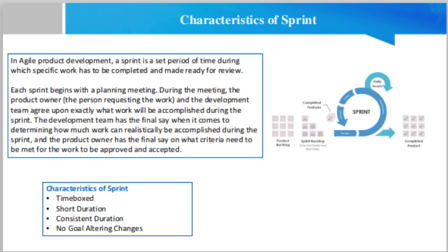The duration of a sprint is determined by the Scrum Master, the team's facilitator and manager of the Scrum framework. Once the team reaches a consensus on how many days a sprint should last, all future sprints should be the same. Traditionally, a sprint lasts approximately 30 days.